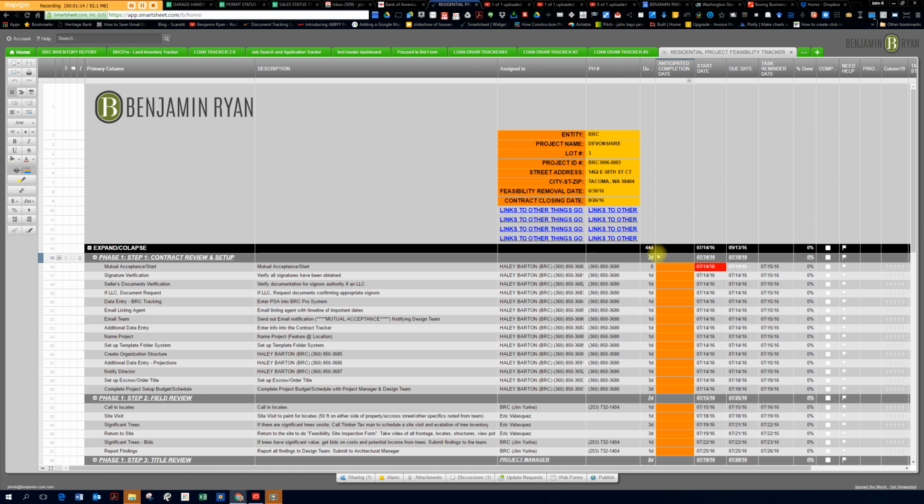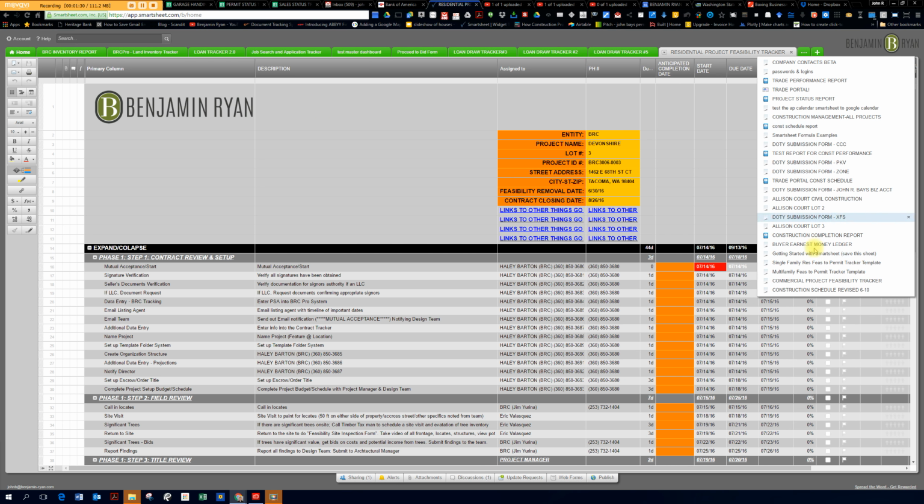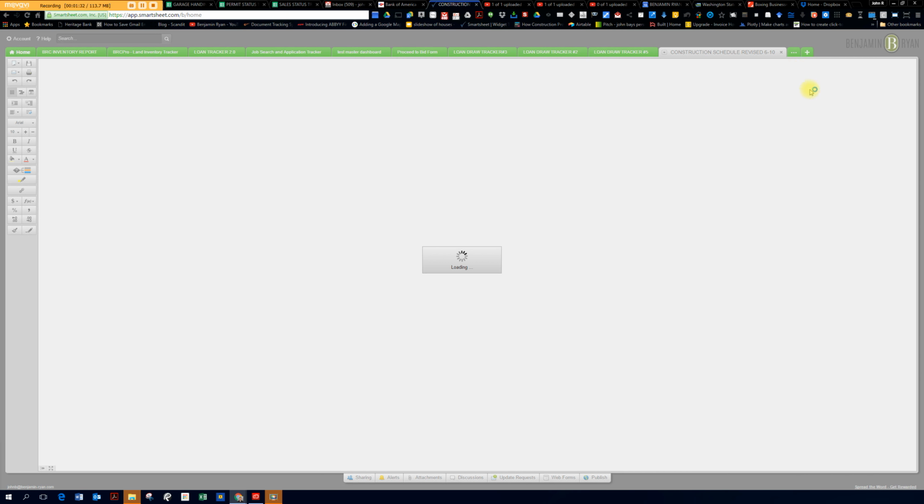The schedules are roughly, for the residential, we have about 60 days from removal of feasibility, about 20 days for feasibility. That's our standard timeline, 20 days and 60 to obtain a permit. And then in the commercial schedule, hop back over here.